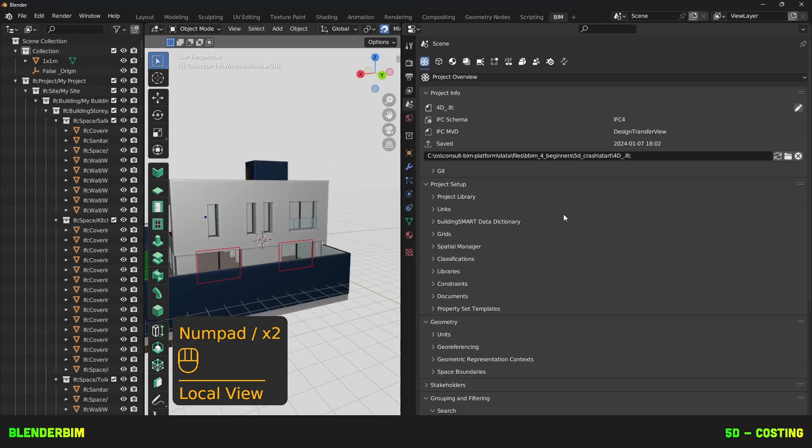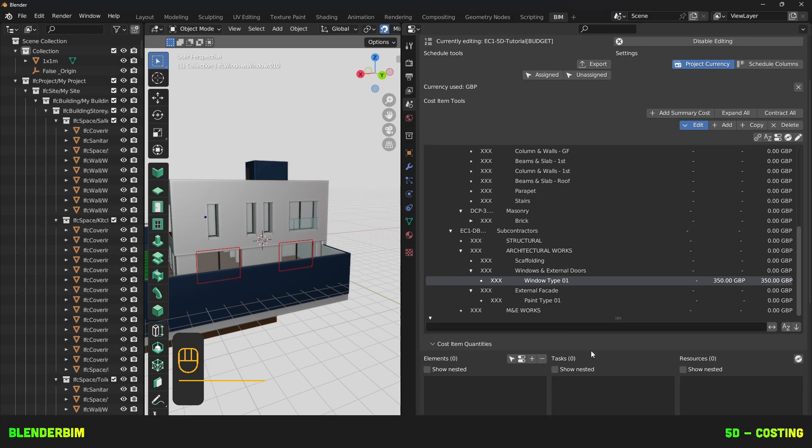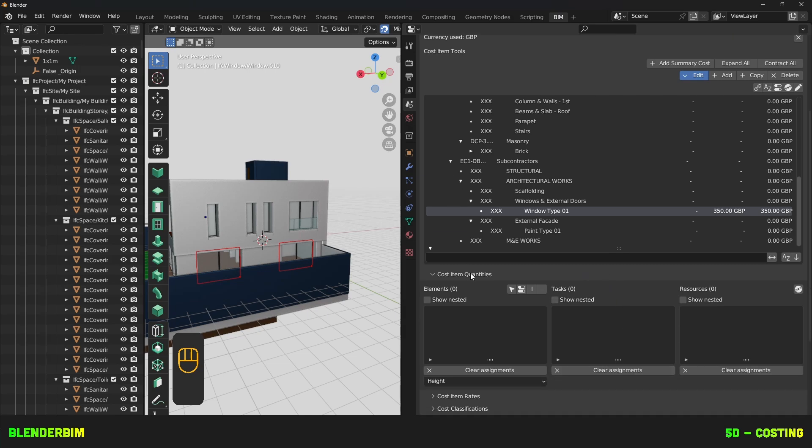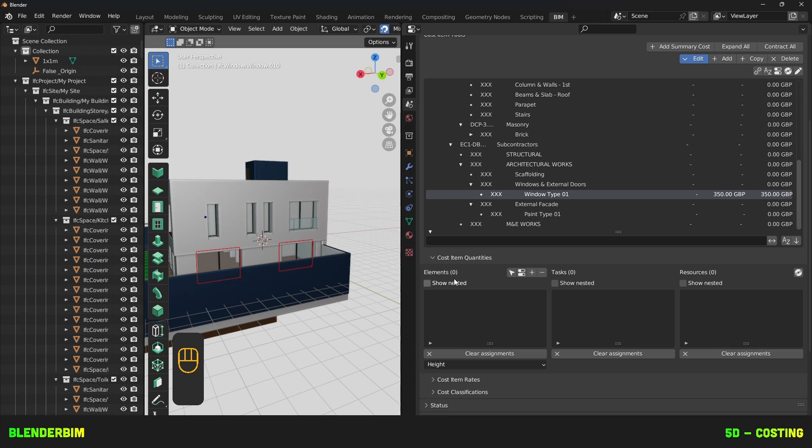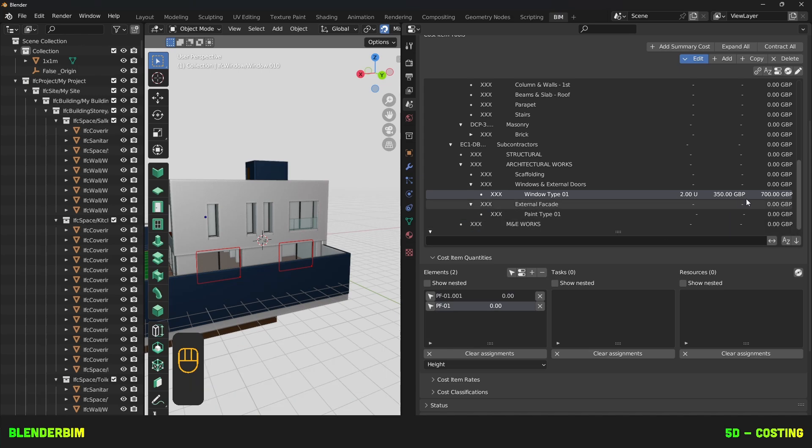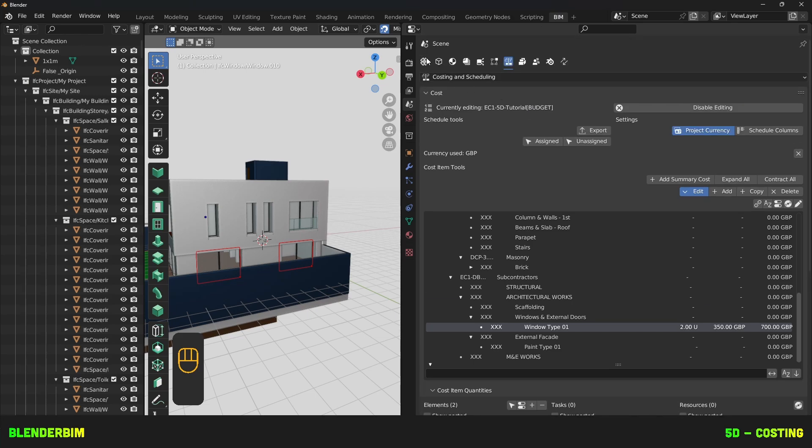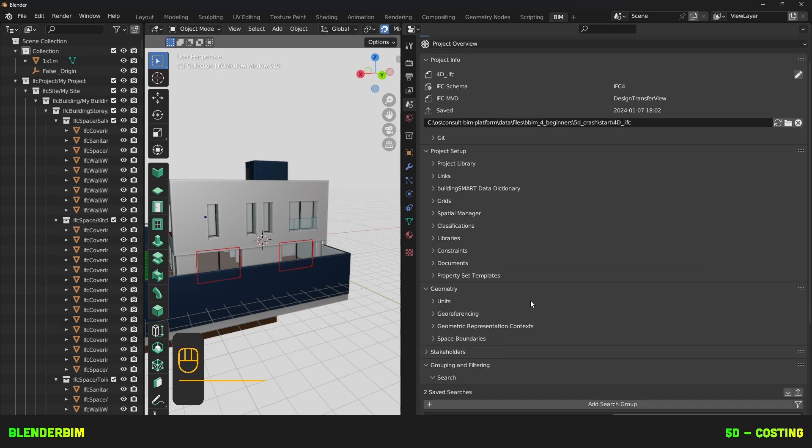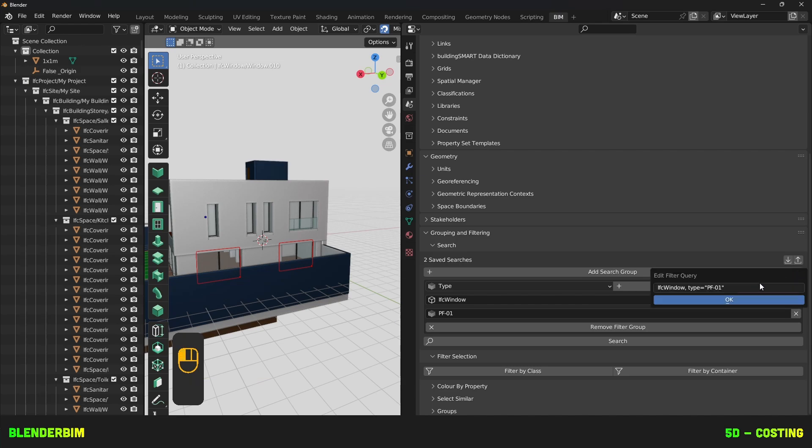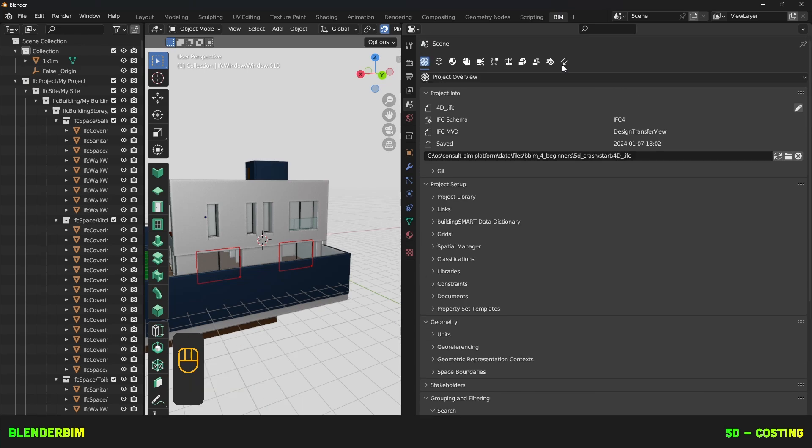Ideally, this would be a larger project, so you would be counting many things, not just these two windows. Then, under the tree, you'll find a Cost Item Quantity subpanel, where it's split into elements, tasks, and resources. Under the elements, press on the plus button, which will not only assign your objects, but also count them. And now you have a subtotal. A little tip we need to keep in mind is to look at these queries when you press on this Edit Filter query. Take note of this, and we'll understand why it's useful later for automating these assignments.